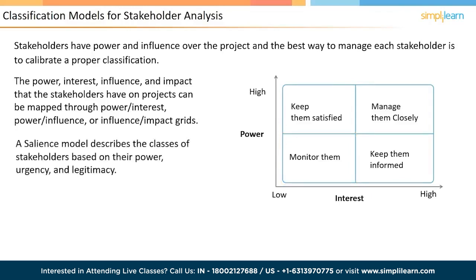The salience model describes classes of stakeholders based on their power, ability to impose their will, urgency, need for immediate attention, and legitimacy, appropriateness of their involvement level. This is a useful framework to guide the stakeholder management strategy on a project.